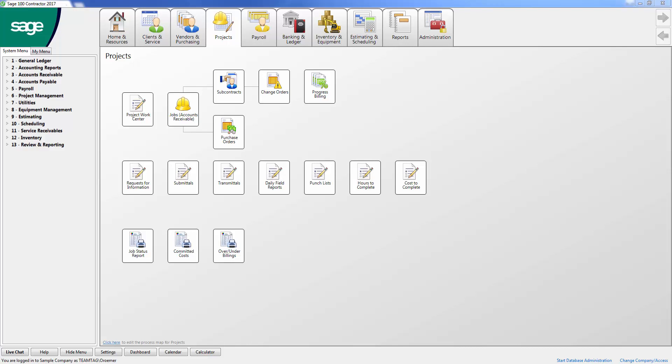Many contractors create a work-in-progress schedule on a monthly, quarterly, or biannual basis. This schedule is used for financial statement, bonding, and lending purposes and can also be used as a powerful management tool. But to be able to get an accurate WIP schedule, you need to have accurate costs to complete.